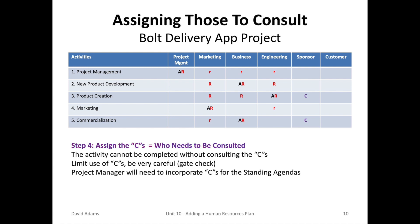The next letter to assign is C — who needs to be consulted? You need to take care with the C because this is a gate. That activity cannot be completed until that person or group approves. So you need to have limited use of Cs. The project manager will need to incorporate those people to be consulted into the standing agendas.